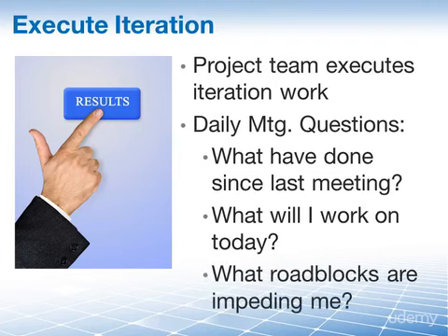And lastly, what roadblocks are impeding my progress? The individual here will state any issues that are preventing them from completing their work, with the intention that as soon as this meeting is over, everybody will try and help this team member to remove that roadblock so that work can move forward uninhibited.